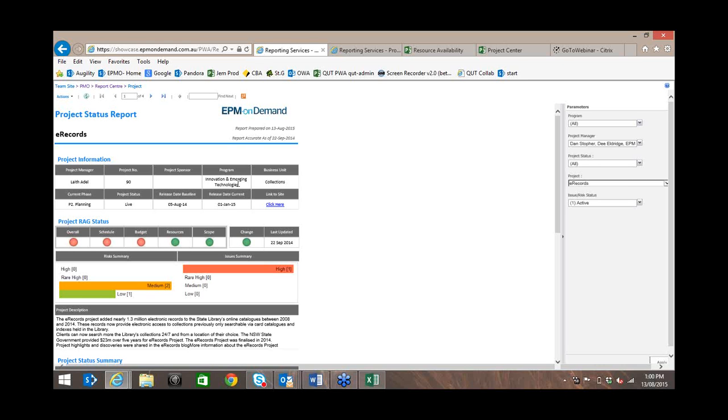I would like to add here that while these reports are browser friendly, so you can use the same report in Chrome or Firefox, SSRS is not exactly mobile device friendly. So there's a good likelihood that a report will not look good if you view the report from your iPad or any other mobile device.